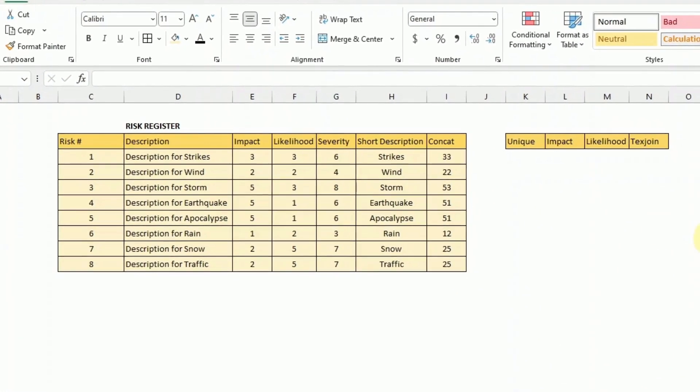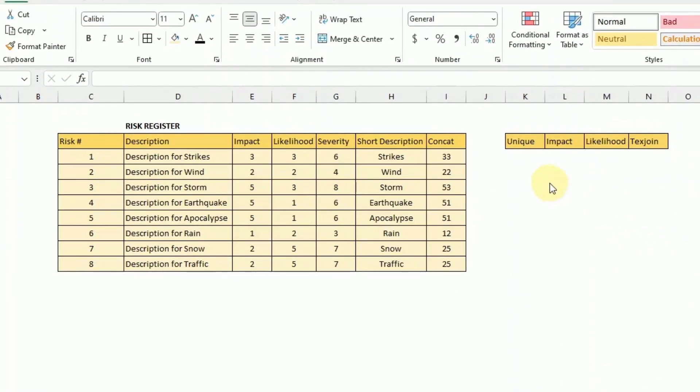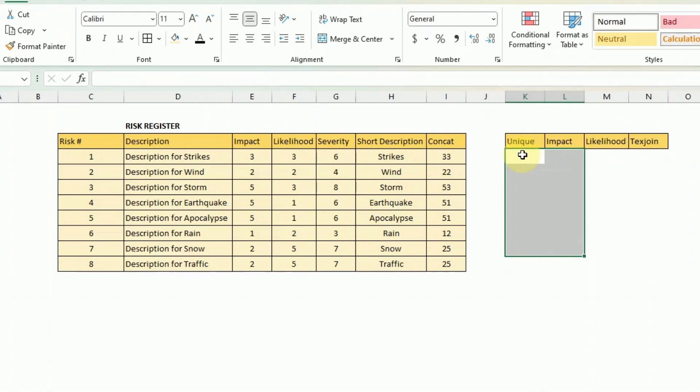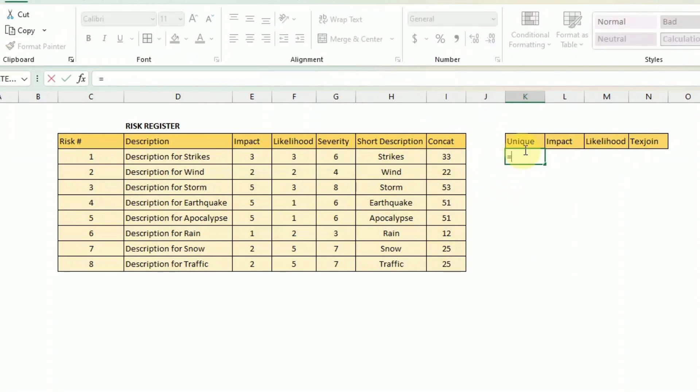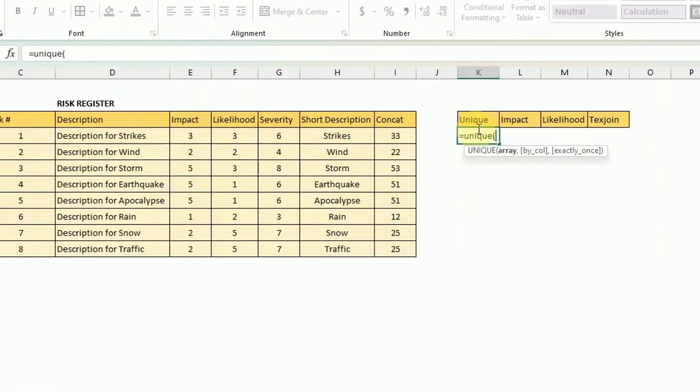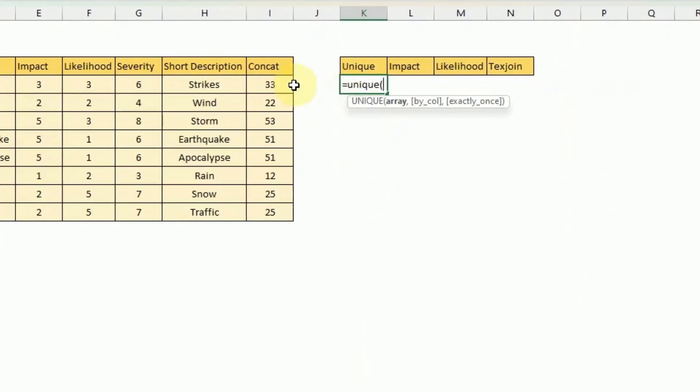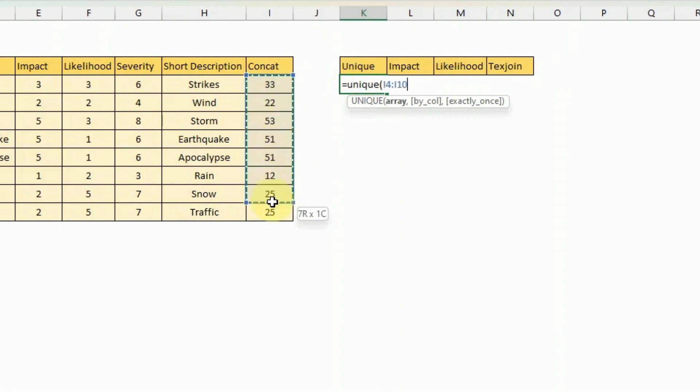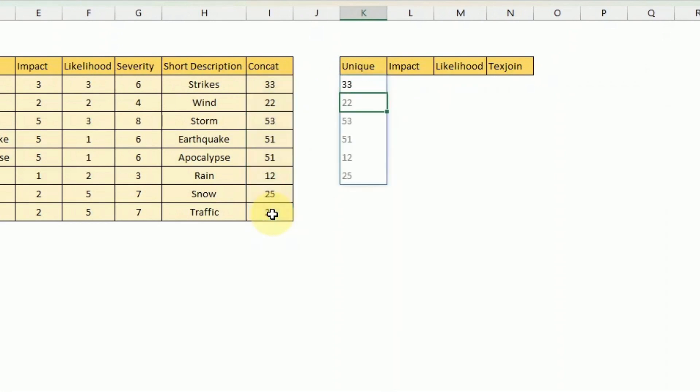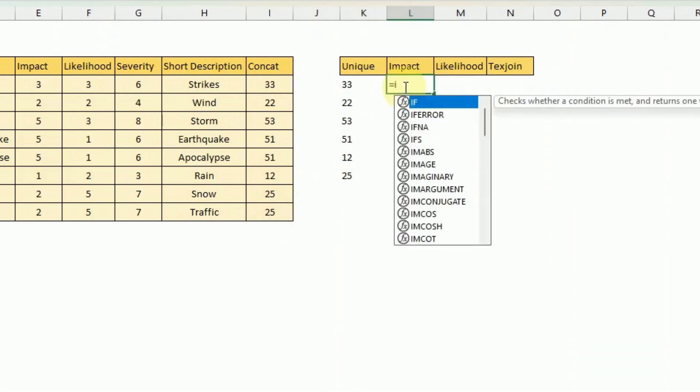Now here I've added several columns. In fact what I'm doing here is a consolidated risk register. The first thing to do is to retrieve only the unique value from that new column that we have created. So you use the function unique for all this and then we need to extract back the impact and the likelihood. I know it's a little bit fiddly but it's worth it.